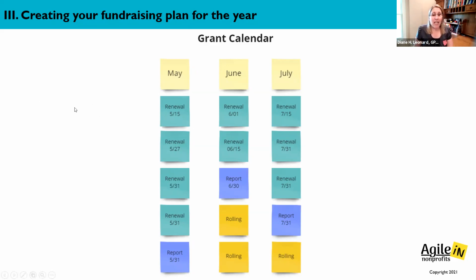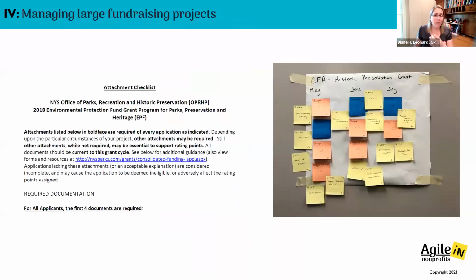Now, one of the things that comes up frequently is looking out ahead. What is the right amount of time to look out ahead? Nonprofit strategic plans, 3 to 5 years. That is far down the horizon, right? That's pretty far out there. Fundraising plans, grant calendars are usually focused on 12 months. Within that, we have large projects, but that take less time. A big government grant, launching a special event. Maybe it's a 2 to 4 week, maybe a 2 to 4 month long project.